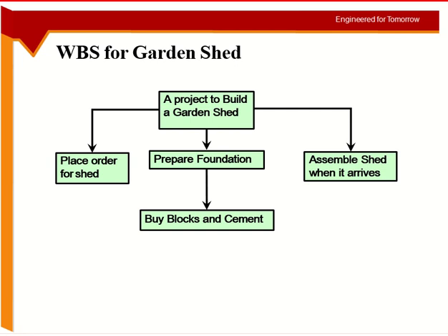Preparing the foundation can be further subdivided into at least two activities. This is missing one activity, I would say, which is after you buy the blocks, you will have to prepare the foundation. So the construction of the foundation, the pouring of the foundation, like the making of the foundation, should be somewhere here. So this is missing one thing.